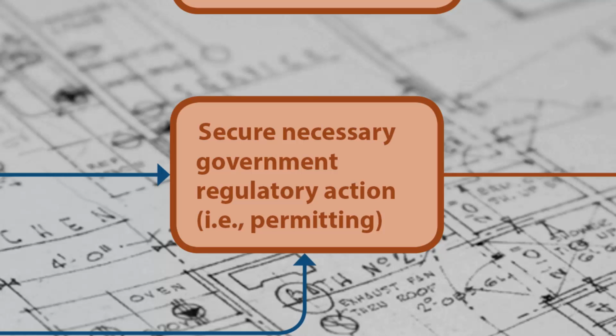Regional infrastructure authorities or utility companies may have to sign off on the project before it can access necessary utilities. Other public funding approvals may come from state or even federal agencies. Projects on environmentally sensitive or waterfront sites may be subject to a host of other reviews and approvals on issues ranging from stormwater, wetland, and flooding concerns to protections for native or endangered species.